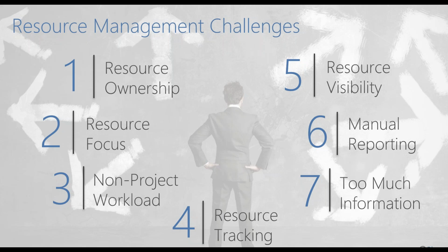And then from a resource tracking perspective, the ability for people to not only plan capacity, then allocate resources to initiatives and work, and then track where people really are spending their time to see if we're actually burning or expending those resources in the way we thought. That resource tracking, if we're not looking at all dimensions of it, can give us misleading pictures of where we're really at and whether or not we are going to succeed, or where course corrections might be needed.